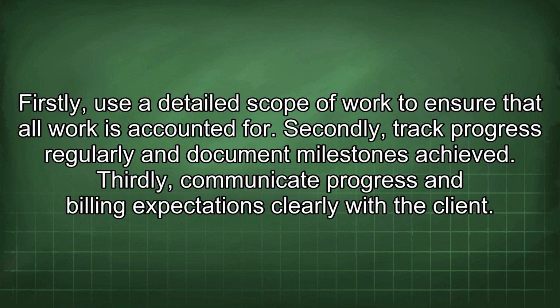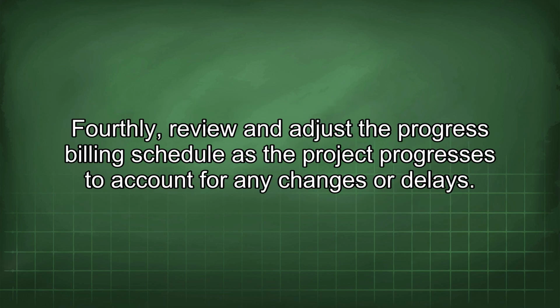Firstly, use a detailed scope of work to ensure that all work is accounted for. Secondly, track progress regularly and document milestones achieved. Thirdly, communicate progress and billing expectations clearly with the client. Fourthly, review and adjust the progress billing schedule as the project progresses to account for any changes or delays.